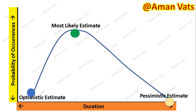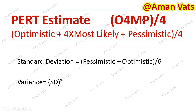Let's say for one activity you have 10 days optimistic, 15 days most likely, and 20 days pessimistic. The PERT formula is: (Optimistic + 4 × Most Likely + Pessimistic) / 6. So that's 10 + (4 × 15) + 20 = 10 + 60 + 20 = 90, divided by 6 = 15 days. So the PERT estimate for this activity would be 15 days.